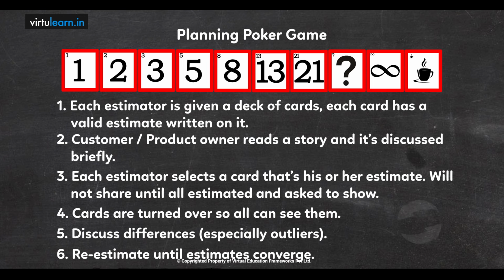Planning poker is an iterative estimation game. It's not a game where majority rules. We estimate until we converge on the understanding of the product functionality with respect to the scope of this particular story, and any technical understanding. Re-estimate the same story in another loop if need be. That's the iterative approach of estimation using the planning poker game.